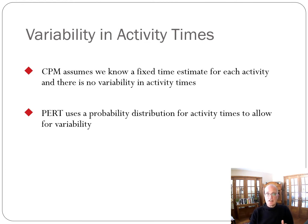As I said, there can be variability in activity times. Historically, the critical path method has assumed we know a fixed time estimate for each activity and there's no variability. PERT uses a probability distribution for activity times to allow for variability. Really, the only difference here is that we don't know definitively how long individual activities are going to take.